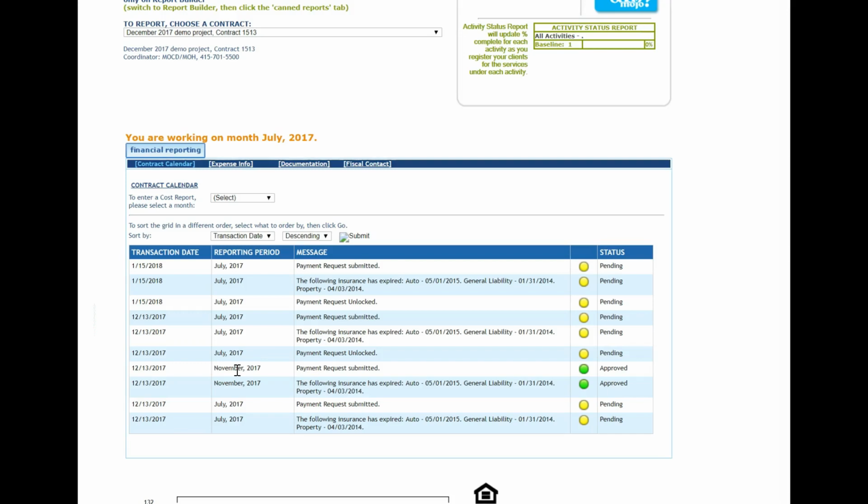The reason we prefer that each month have a report, even if it's 0, is because then the project balances stay in line. If charges for October are entered now, TGS will still process that invoice, update the line item balances, and will update the balance taking all submissions into account. It just keeps the system and balance tracking cleaner if reporting is done every month in order.